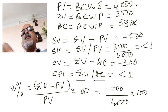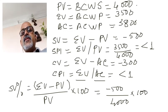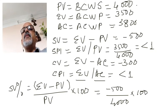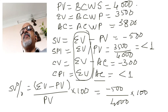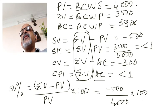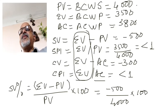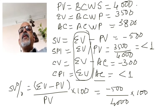A useful shortcut to remember all these formulas is that Earned Value always comes first. Schedule Variance = EV − PV, SPI = EV / PV, Cost Variance = EV − Actual Cost, and CPI = EV / Actual Cost.